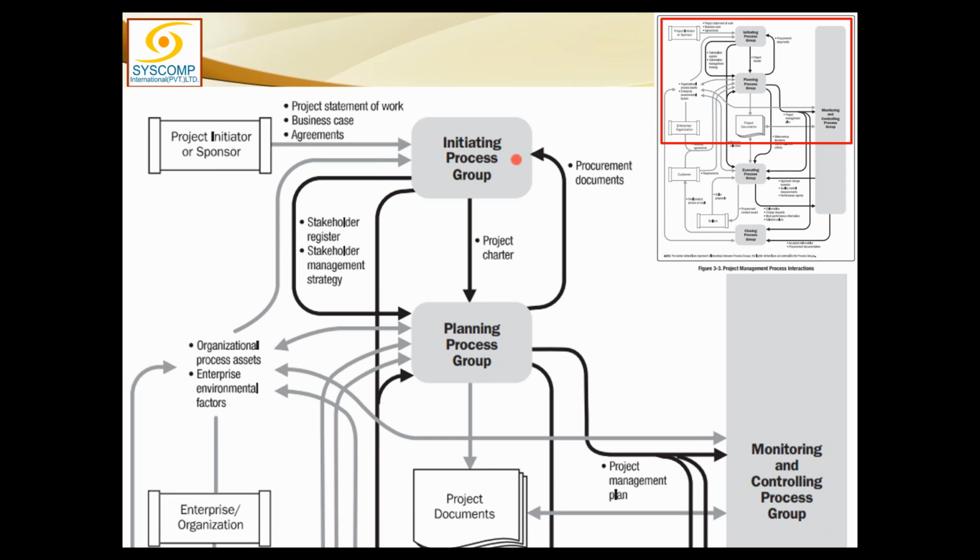We should not straightaway jump into the work of the project. Rather, we should look at the needs and expectations of all those who are going to be the stakeholders of the project. So I must identify who are the stakeholders. I will identify and analyze those stakeholders. This is done in initiation.